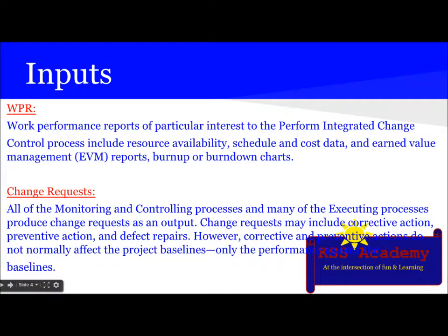The next input is WPR, work performance report. Reports of particular interest to the Perform Integrated Change Control process include resource availability, schedule and cost data, earned value management (EVM) reports, and burn up or burn down charts.